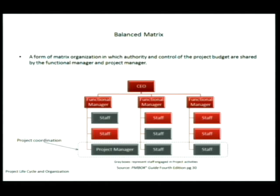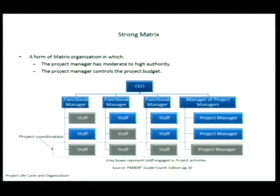In the balanced matrix, the project manager is now on the radar and begins to manage. The project manager's authority is shared with the functional manager — that's why we call it balanced; it's better than the functional and weak matrix. Moving on to the strong matrix: there's a manager of project managers, the project manager has more authority — moderate to high — and controls the project budget.